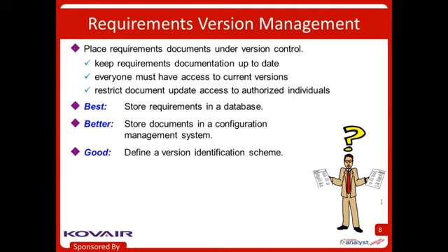If you're doing what a lot of people are still doing, which is fine, creating requirements documents that you manually label and identify so people can tell them apart, we can make that work, but there are some things to watch out for. I would suggest you avoid documentation identification schemes that are based on dates. Is it the date that the document was last printed? Is it the date that it was last revised? What if we change it and then don't print it, but we don't change it, but then we print it and get a different timestamp?